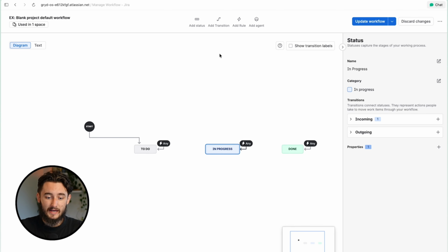So what I like to add in here is a to-do, and then I like to add one that's ready for development, because sometimes you just need a little bit more of a backlog-style column. Especially when you have more people involved in a team or company, you could start pulling things into ready for dev, and that immediately signals to the rest of the team the new future things to actually work on.